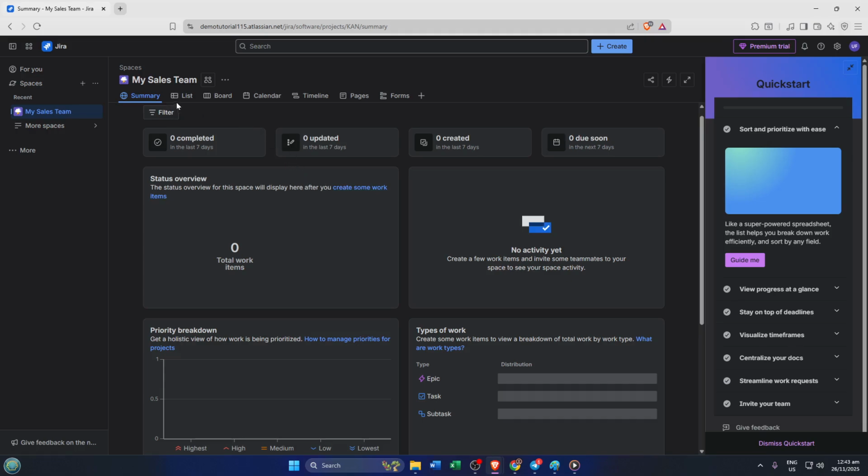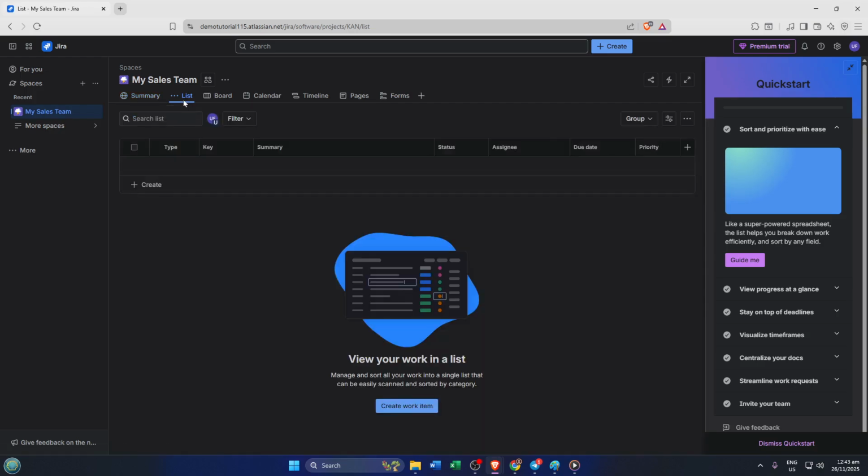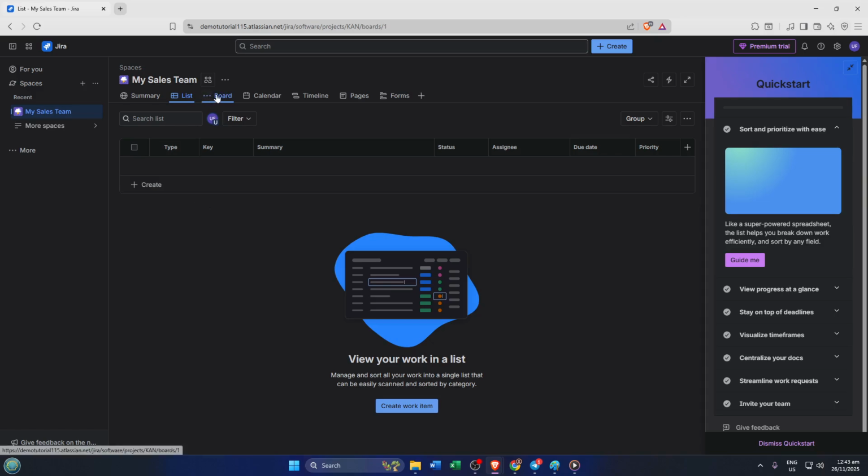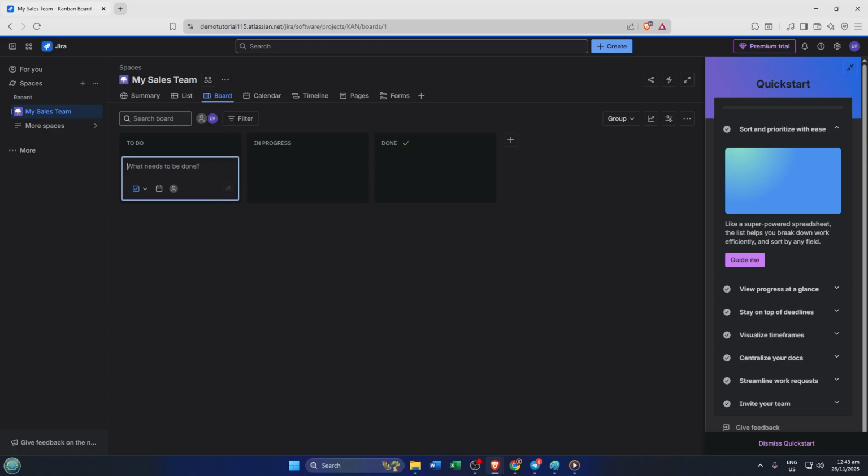Now, time to assign the task. The Assignee field lets you pick who will be responsible. You can assign it to yourself, or to a teammate. If you leave it blank, Jira might auto-assign it to the project lead, or the task could be left unassigned depending on how your project is set up. So, if you know the right person, go ahead and select them. This helps everyone know who's on point.